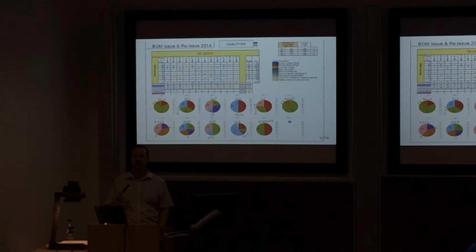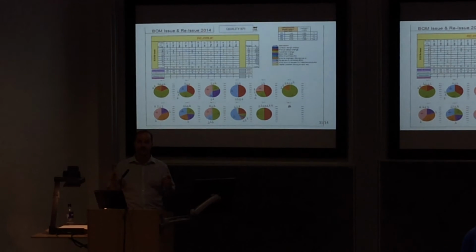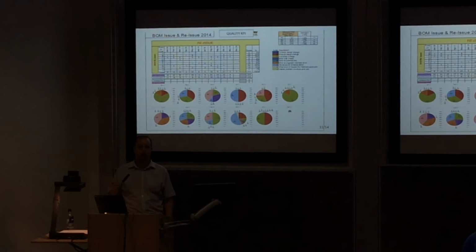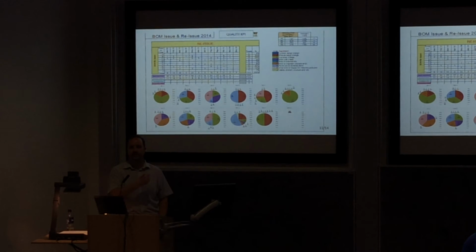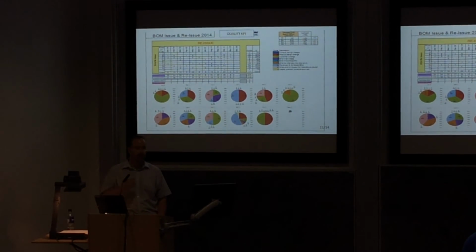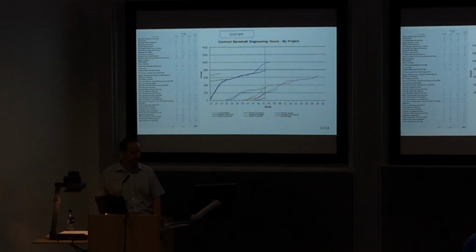When you're working in a large engineering company, the customer is a very tricky character, and he may be always right, but he is always very tricky, very difficult, because he can change and then change and change again. So when a customer changes his requirements, we have to change our designs and reissue the instructions to the shop floor. It can be very difficult, but we need to be able to control it and ensure that we are not doing too many changes while we still meet our customer requirements.